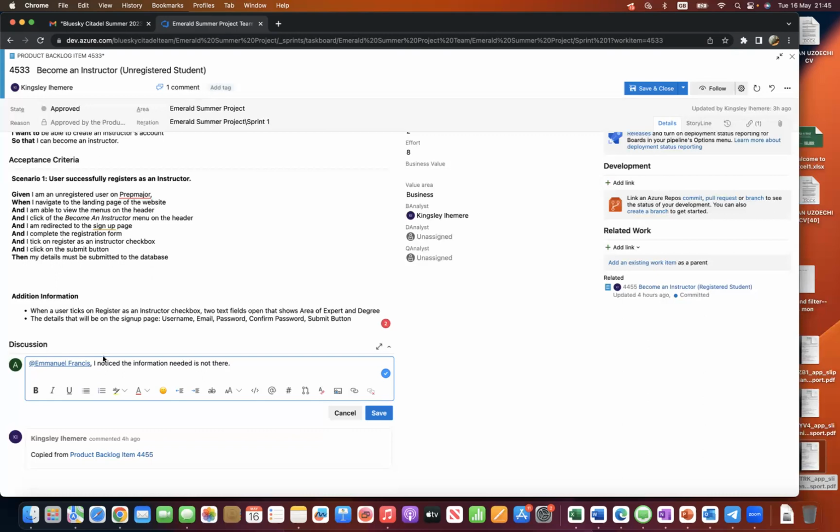So let's assume there's a story, the BA has finished the UAT on it, and they put it in UAT done. You want to take it as a Scrum Master to done. You notice that 2 out of the 3 tasks on it have been done, 1 has not. You open it, you check which one, you notice it is automation. You check with the QA that has worked on it: I noticed the automation story is still in progress, has it been completed or is it pending?